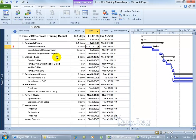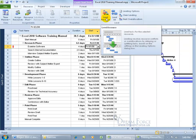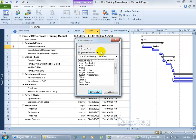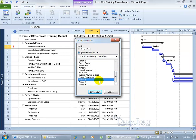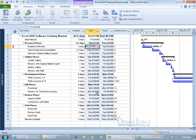Another option after hitting Undo: come up on the Resource tab to the Level group and click Level Resource. Make sure the selected resource is Writer 1 and the project selected is Excel 2010, then click Level Now. You can see it pushes the task out automatically — pretty much the same result as manually adjusting the date.